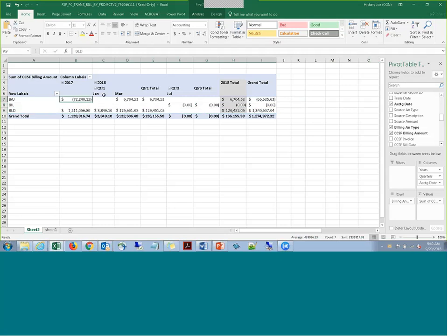The billing adjustments are, this user has gone in and, because of likely bad data, as we were fixing the bad data issues coming in from the other modules, they went in and did a billing adjustment. So they either adjusted the entire bill or adjusted lines on that bill, and so that comes over as a BAJ analysis type.